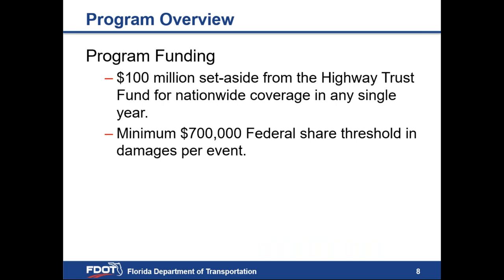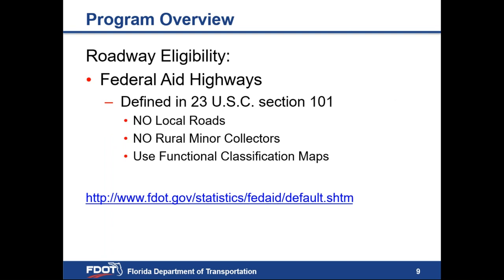Each year, there is a $100 million set aside from the Highway Trust Fund for nationwide coverage. In order for emergency relief funding to be requested, there must be a minimum of $700,000 in damages caused by the event. The FHWA ER program provides disaster assistance for federal-aid highways. Local roads and rural minor collectors would fall under FEMA.